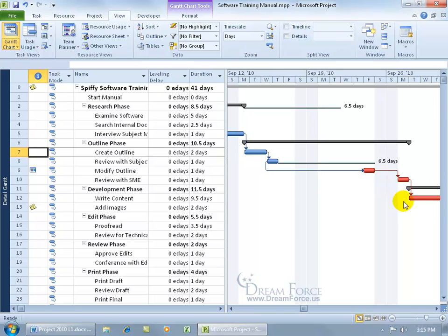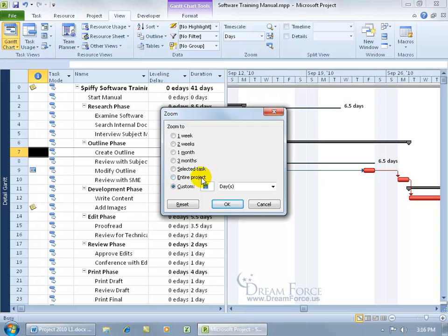And then it knocks all the other ones out, and we don't finish on time. So this free slack is taking into account these other 2 tasks here. If the research phase as a whole, or any of its subtasks, goes past the 21st, it's going to knock these out, and that will become critical, and then it's just one critical mess, and we don't finish our project on time.